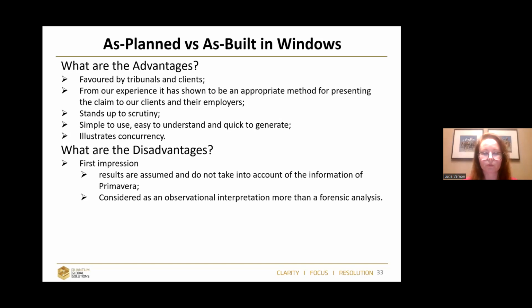This sheet is also very useful in talking about concurrency and seeing actually what happened. Because sometimes what you see on the bars from P6, you just see a long bar, but you don't see what is behind it. There are often mistakes when the contractor is, for example, 99% complete, but there's still 1% missing. So this could be misleading, and it can be taken as a concurrent delay, which is of course not equal magnitude to the other things.